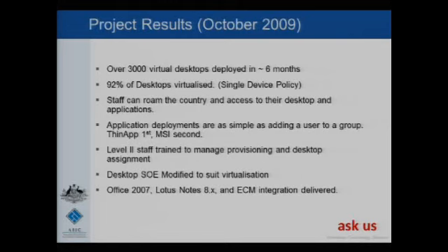Yep. So the question's about why wouldn't we repurpose the PCs? PCs still have a significant power factor. And we really wanted to get down to the low voltage power devices. And we had the funding to do the thin clients. At this time, 2 years ago, there wasn't a great solution to repurpose desktops. There are a lot out there now. But at that time, it seemed to be a little bit risky. But it can be done.